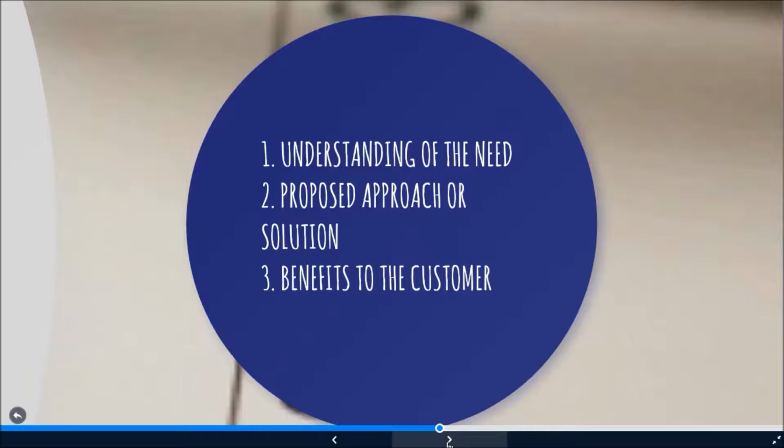So a problem may require that an analysis and development task be conducted as part of the proposed project before a specific solution can be described in detail. So in such cases, the contractor's proposal must describe the approach or methodology that would be used in developing the solution.